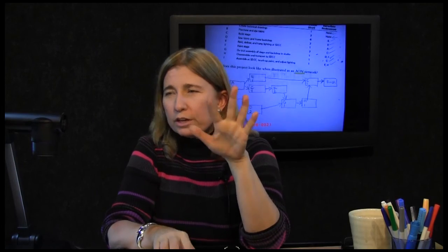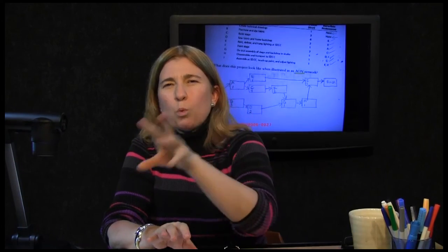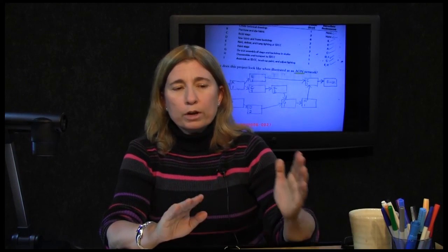At the point that you've done, you should check, because it's not always just one last task to the right that needs to be connected to the finish. Just do that check. In this case, it is only task I that needs to be connected to the finish. Do that, connect everybody up. We have a start, we have a finish, and we have drawn each of the tasks that's on the table. We have our activity on the arc network.